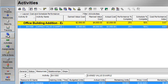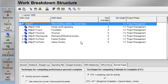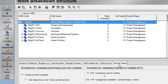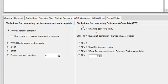The technique for establishing how you want to calculate estimate to complete is done at the WBS level. In WBS details, there's an earned value tab. And on the right hand side, you can identify your technique for computing estimate to complete.